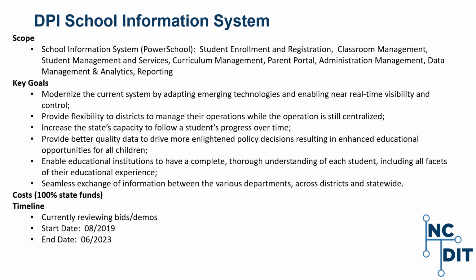Key risks and challenges include an aggressive evaluation and subsequent implementation timeline driven by the current contract end date of March 2022. Mitigation includes optimizing the plan and obtaining approval and commitment from all stakeholders to the plan, identifying and communicating tasks on the critical path, strong issue and risk management, and ensuring delays are escalated and handled according to the escalation process established at the agency and project levels.